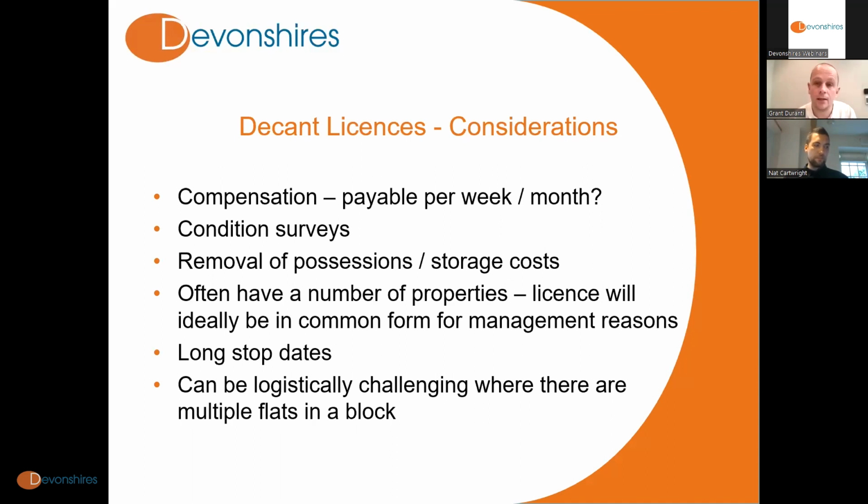Often in these scenarios, you have quite a lot of flats. So ideally, you want the license to be in one form, just for simplicity of managing the project, and because that way you only then need to familiarize yourself with one type of license, rather than each license having slight nuances, which you then need to factor in.